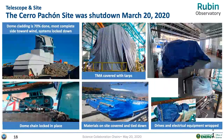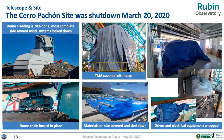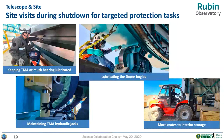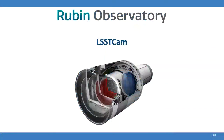The summit was shut down on March 20th. This is a montage of the current state of the summit — given that winter is on its way, we've tried to protect as many exposed elements and systems as possible. Even during the shutdown, we are sending very small crews up to the summit with very specific tasks, mainly to maintain the hardware through the winter months. A full resumption of operations won't occur until after the winter has passed.